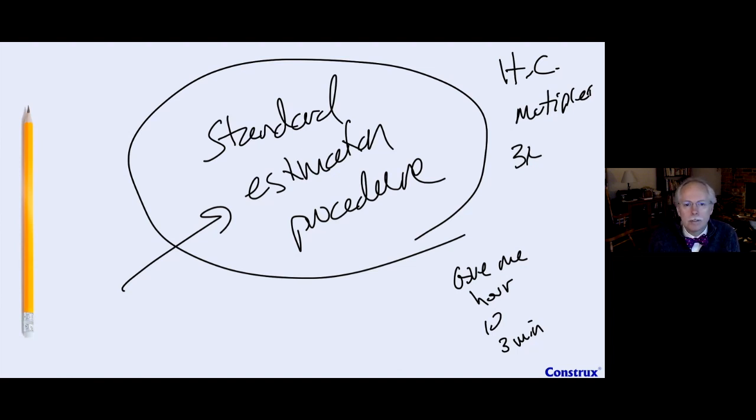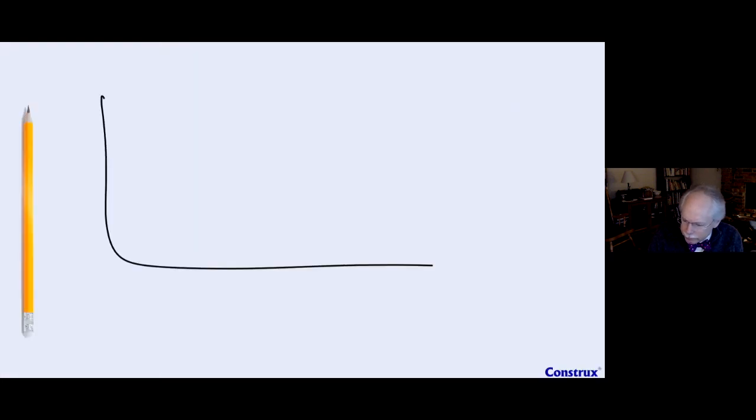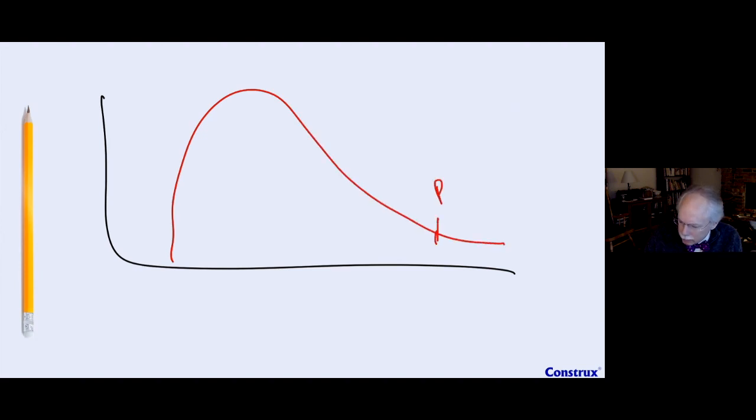Okay, Earl, here's another question for you. Is it worth looking at each estimate in terms of plus or minus a percent? For example, 100 days plus or minus 10%? Yeah, so we're getting into how we present the number. Because if we have the curve, and we want to pick a point on the curve, how do we present it? Here's my promise. Do we present it as a single point, X, or do we say it's 8 months, minus 5 plus 3 to our most likely, or you pick a point here and it's plus 3 minus 2. It depends what happens.